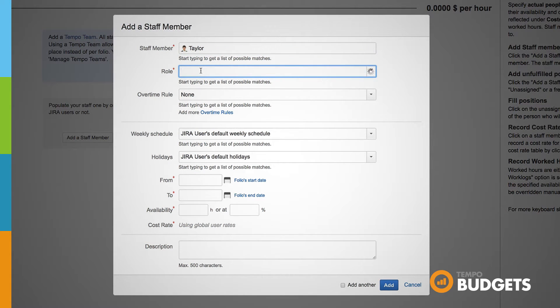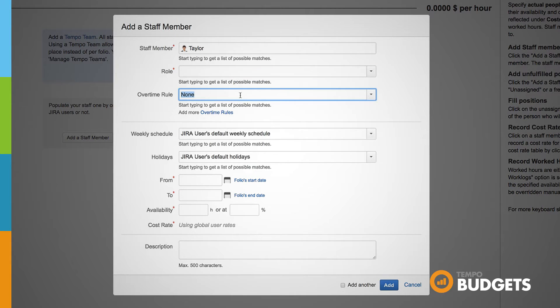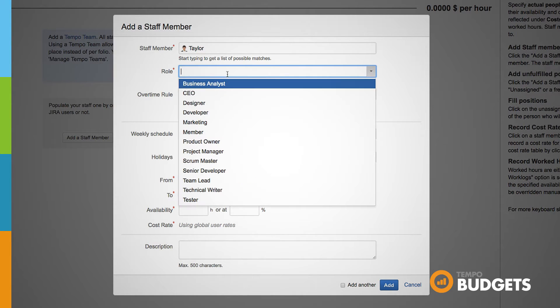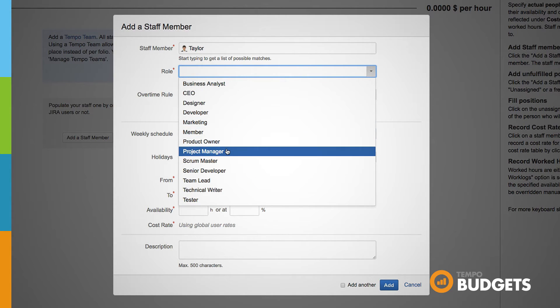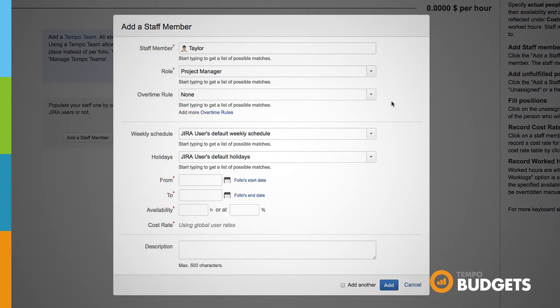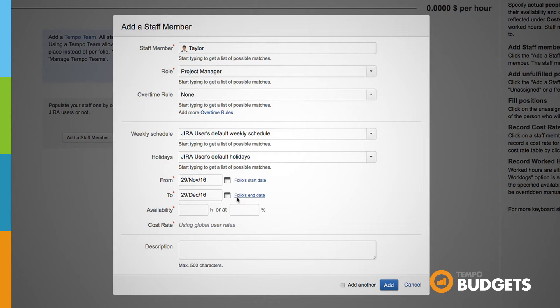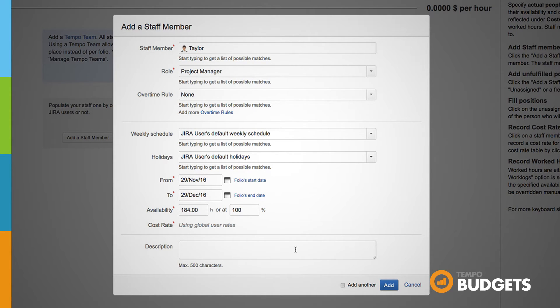Start typing the name of the member you'd like to add and suggestions will automatically come up. You can then choose their role, add an overtime rule if you like, a weekly schedule, and a holiday scheme. You can then choose the time period they will work on this folio and add how much time will be allocated to them for this folio.